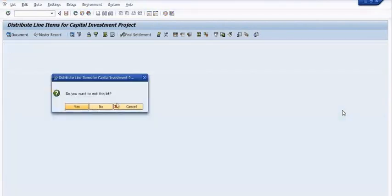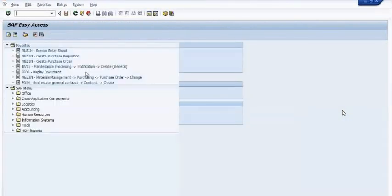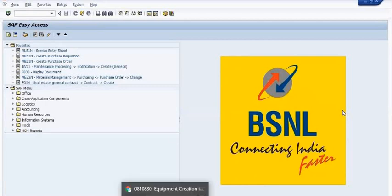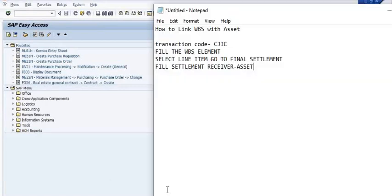Then we need to execute the transaction code CJ88 for the full settlement. This is how you can link the WBS with your assets.